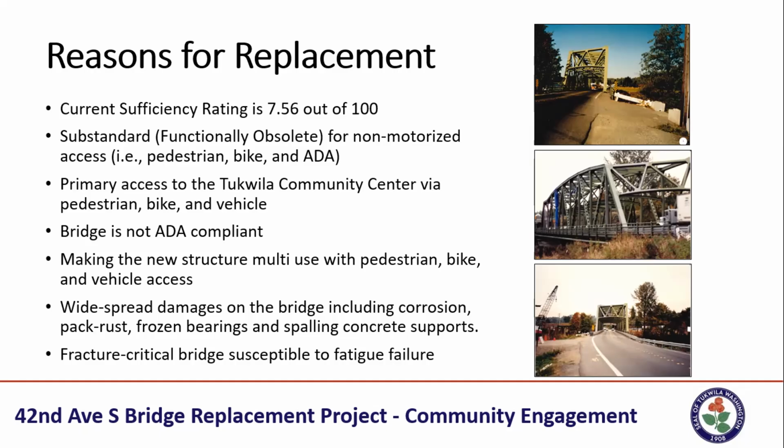Following these inspections, it's been found that the bridge is fracture critical and is exhibiting widespread corrosion and pack rust. The approaches to it also show a lot of concrete spalling due to the extreme skew of the bridge.